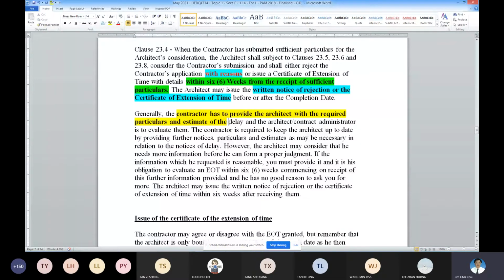This March one, with the extension of time granted already, is revised already. Once it's revised, it could be revised by the contractor in the month of April or May. So that new revised working program will be used as a basis for the extension of time claim for that particular activity that falls in the month of April or May, to do the evaluation.